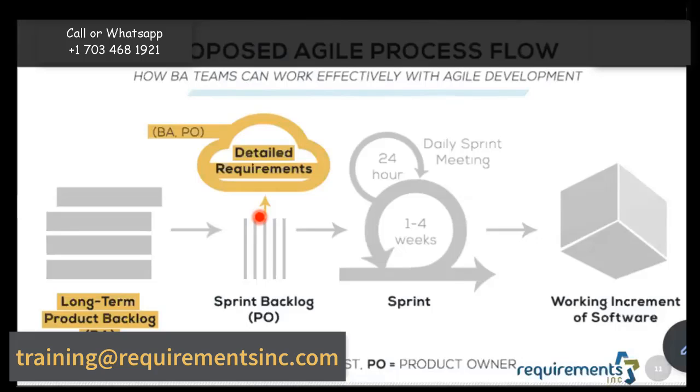Last sprint we did really well. We thought we'd do 10, but we were able to pick up 12. So maybe I'll pick up 12 this time, right? And then the next time you take up 12, you're not able to achieve 12. You're only achieving 11 points in that sprint. So your velocity, in other words, how much you can deliver per sprint as a sprint team, is called velocity.